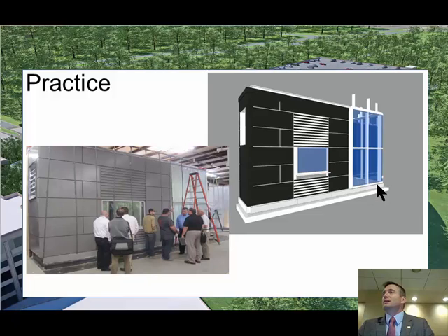If we hadn't done it this way, for one, they would have showed up with all their parts in Dallas, and our mock-up would have been weeks later because they'd have been trying to figure out how to make it work instead of figuring it out in a model. And then if we hadn't done the mock-up, that's a whole other step. They would have been out there at that beautiful building you saw, installing all that glass, finding out that it leaked. And the vast majority of suits within our industry, the legal cover-your-tail sort of thing you were talking about earlier, come back to waterproofing and leaks.